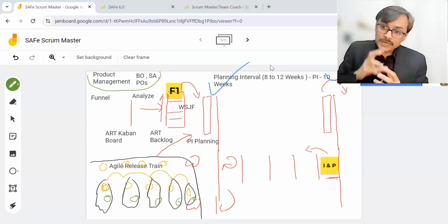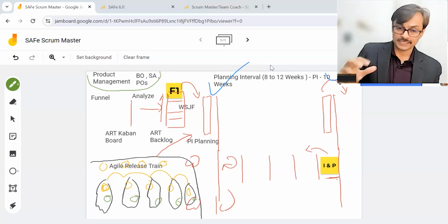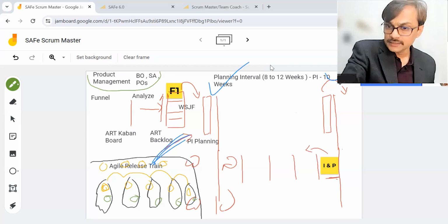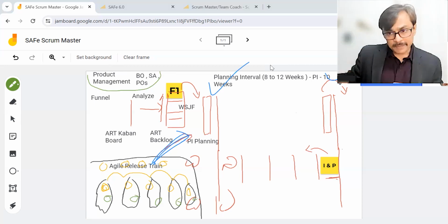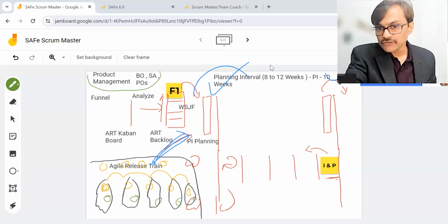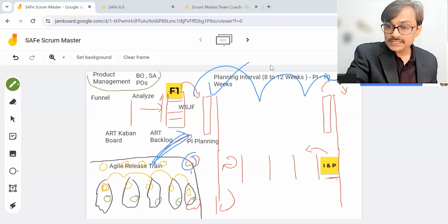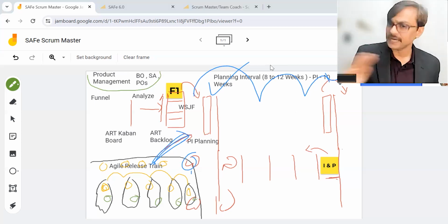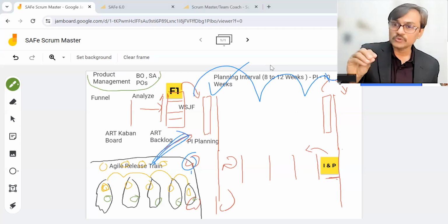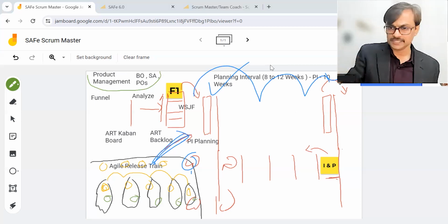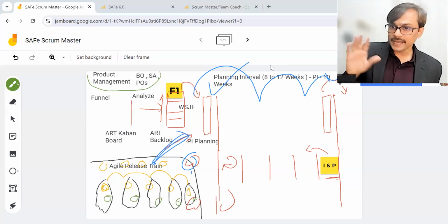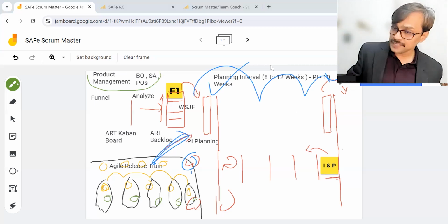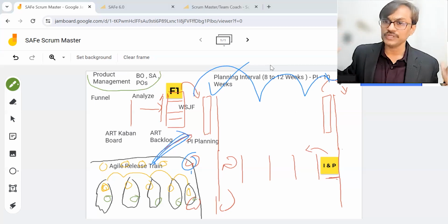We also do a common planning meeting, which is called the PI planning meeting, where the whole community of our Agile Release Train, which means all 100+ people who are part of the train, participate. And in that PI planning meeting, they plan the work for the upcoming PI. Means each team plans at a high level, not a very detailed level, not at a sprint planning level, but at a high level. You can relate to your old release planning level. So stories, velocity-driven planning, if I'm using the Scrum terminology. So each team does velocity-driven planning for the upcoming PI, and they have a tentative plan for each and every sprint by which they can say, this is the work we are going to do in the upcoming PI.